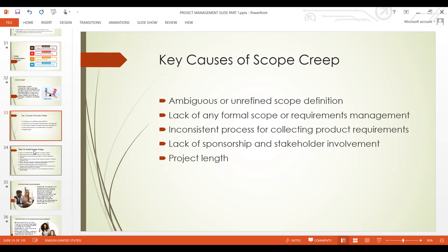Yeah, they might have given you a project brief that this is what you need to do, but you need to gather requirements. You need to speak with them one-on-one. Document what they've said, and after documenting, let it be validated. That means their involvement. When you produce a project charter where the project sponsor authorizes, appending his or her signature, that means involvement. And that's how to manage a project.